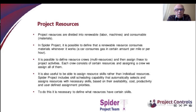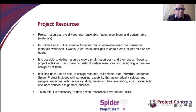Project resources are divided into two types: renewable resources and consumable resources. Renewable resources are people or machines that can be used again after they finish their work. Material or consumable resources disappear when used. They are totally different, and that is why in Spider Project they are not simply resource types but different objects. You can assign materials to resources — for example, assign gas to a car and define that the car consumes gas when working — and Spider Project will then calculate the requirements for gas.